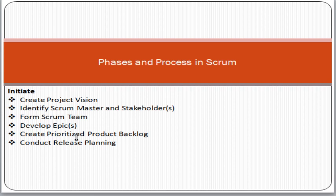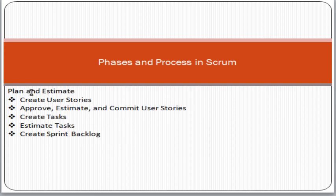Then we create the prioritized Product Backlog. The Product Backlog is the complete list of requirements for the product — think of it like a scope document or Excel sheet where all requirements are listed priority-wise. Priorities are set by the Product Owner. Then we conduct Release Planning — for example, after every four weeks we release deliverables to the customer, planning how many releases will be made within the project timeline.